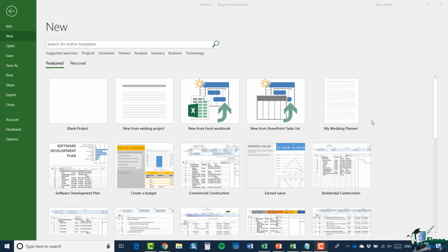Having said that, when you're using Microsoft Project, making sure that your calendar or calendars are set up is one of the things that you should do very early on in the work on a project. And you'll see this as I explain the use of calendars from now on. After going through at least part of this section, you may want to take a look at the calendars for the wedding project and for the bathroom refit.